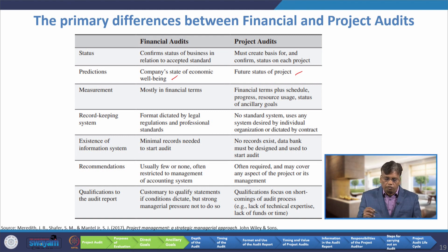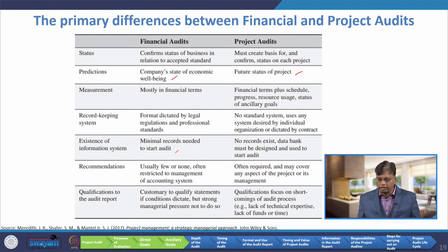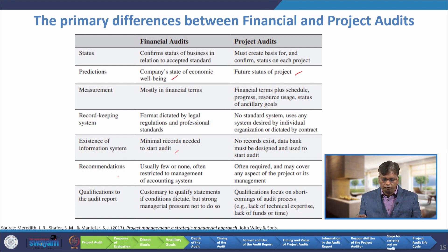With respect to record-keeping system, financial audit format is dictated by legal regulations and professional standards. For project audits, no standard system exists — any system decided by the individual organization or dictated by the contract is used. With respect to existence of information systems, financial audit requires minimum records needed to start an audit, but for project audit no record may exist — a data bank must be designed and used to start the audit. With respect to recommendations, financial audit usually yields few or none, often restricted to management of the accounting system, but for a project audit, recommendations are often required and may cover any aspect of the project or its management.